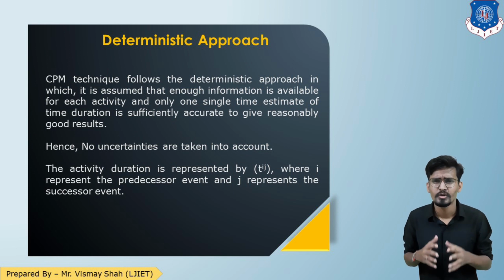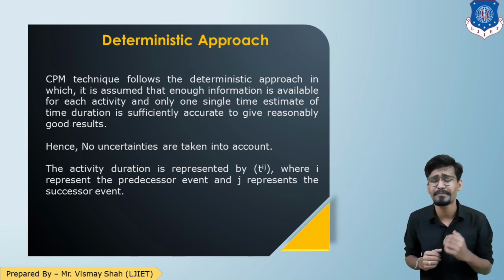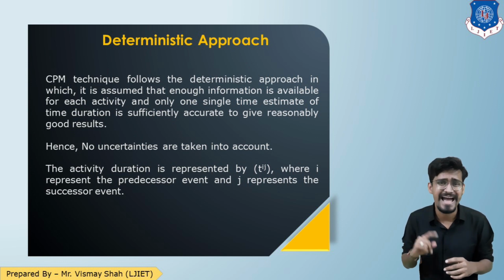All right. So hence no uncertainties are taken into consideration. The duration of the activity is represented by Tij, where i is the predecessor event and j is the successor event.